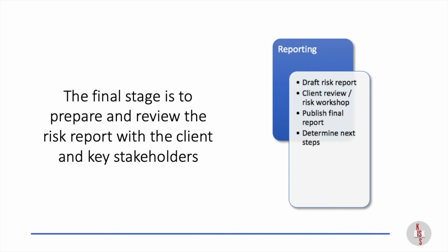You then need to review it, and I would say you review it in two stages. You start by reviewing it with the key stakeholder, or the client sponsor, the project sponsor. Review that with them, because they should have the best view of what the intent is and also the parameters and scope. So go through that, and that's your first sense check of the document. And you may need to go back and make some adjustments and changes.